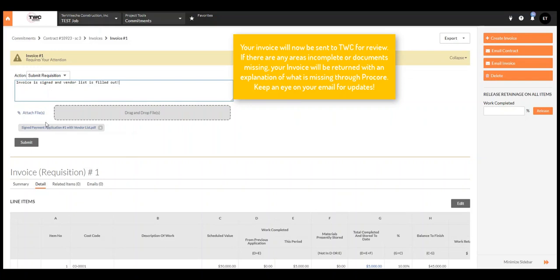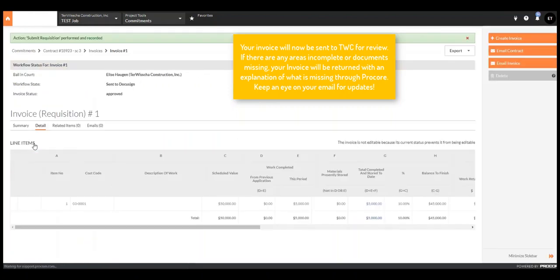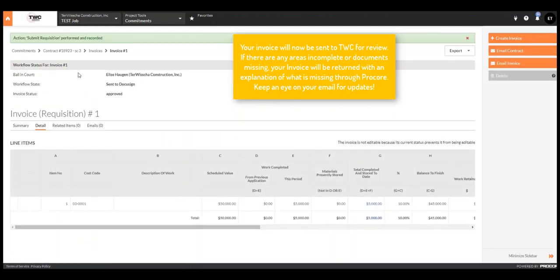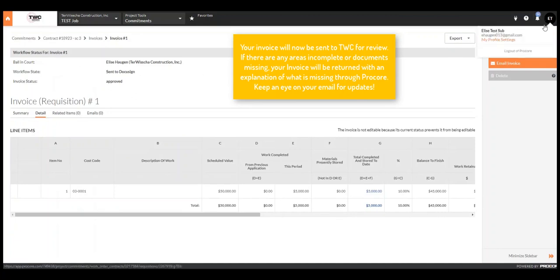When you're done, hit Submit. Your invoice will now be sent to TWC for review. If there are any areas incomplete or documents missing, it'll be returned with an explanation of what is missing through Procore. Keep an eye on your email for updates.